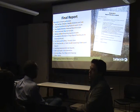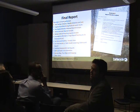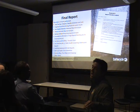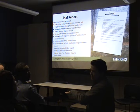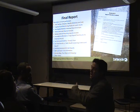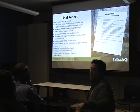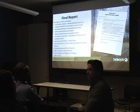Right, and that should be done before anyone starts work on the site. One of the requirements, and it's stated in our guidelines, is that you should have a CAC go out there and assess it first. If you find asbestos on your property, then that's special abatement, and you have to have a contractor with proper license. We didn't want to spell out every last contingency, but that's the start of the process, is to get the hazardous waste off the property first, and then have the CAC go through, and once the asbestos is abated and hazardous waste is abated, then you can go through a general cleanup without a hazmat.